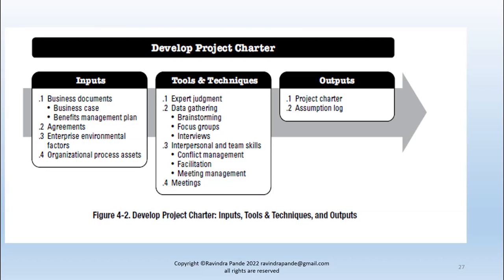Yes and no. Yes, because we normally include these things in our risk register. Risk register is a kind of list where I mention risks. There's a specific knowledge area called project risk management where we understand this. Risks are basically notified in the risk register. They are reviewed as a risk register item for that day, or in the risk reviewing meeting where we review all the risks mentioned by us. And most of these risks are normally derived from the assumption log. That's why the assumption log is a very, very crucial factor.